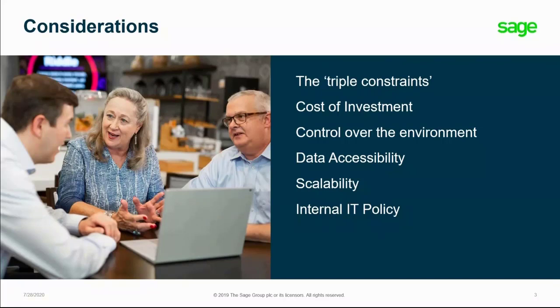What is the budget for the project? Are we able to allocate a certain amount for initial procurement of the hardware? Is the scope business critical, such that we can only go live when development of all the scopes is completed? Do we need to fast track or crash the timeline? These are the triple constraints that we need to take into consideration, whether the lead times of the procurement and the shipping of the hardware, the scope and budget will greatly impact the overall timeline of the project.